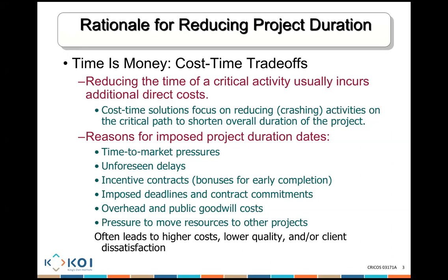That's the indirect cost. And that indirect cost, guys, is more related to when we reduce the work required on a work package or work activity. Yes, that cost is increasing, but if the project is finishing earlier, my indirect cost is actually reducing. For example, my cost to rent an office is reducing. My cost to have a project manager is reducing. My cost to have a consultant is reducing. All of these costs basically go down. If I reduce the activity, it might cost me more, but all the indirect costs are going to be reducing.